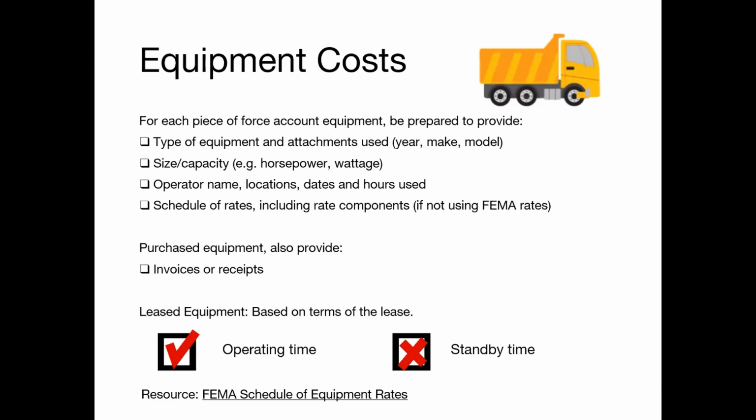It is important to note, in accordance with federal regulations regarding disposition, if the equipment is no longer needed for federally funded activities, FEMA may reduce the eligible funding by the equipment's current fair market value. FEMA publishes national equipment rates based on all costs associated with ownership and operation, except labor, including depreciation, maintenance, etc.